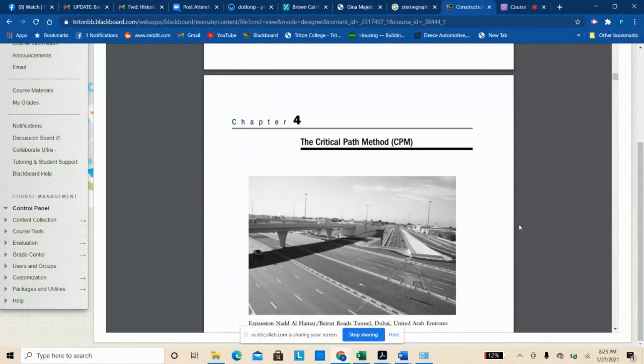The precedence for that permit process is, as somebody already mentioned, design. You have to do your design, get that all squared away, showing the work you want, and then take those drawings to the city or state permit office, wherever you're going, and get it permitted.